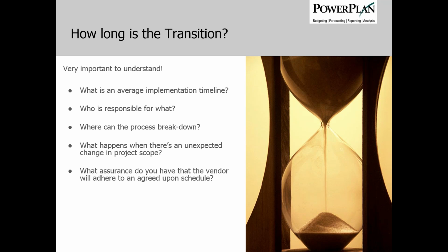To give you an idea, for let's say a small to mid-size nonprofit organization, the implementation cycle is roughly 2 weeks, maybe 2 to 3 weeks. Public sector implementations tend to be a little longer. They tend to involve more users and varying types of user roles, and an average timeline for a public sector implementation is generally a 6 to 8 week time span.